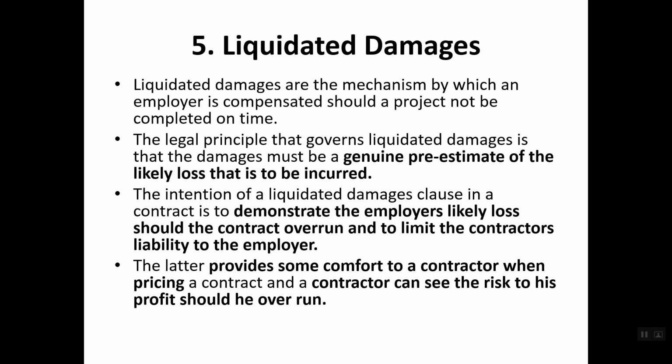You should facilitate each and every party, and every party should be within your project. That facility should be given as a contract administrator. That is why these kinds of things are addressed at the initial stage, by your contract document. If not, and we give the liquidated damage amount at the completion date, the contractor will be in trouble, because initially he didn't know what amount of liquidated damage was going to be charged.